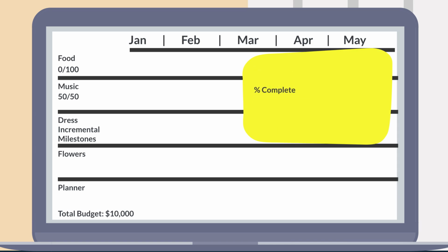Now to the percent complete EV technique. This is perfect for longer tasks, where you can measure progress across many periods and just report how much is complete as a percentage. There are 2 tasks left that would take a long time to complete: tulips and project management. Right, but only the tulips' progress is objectively measurable. So, I'll use percent complete to report on their growth.